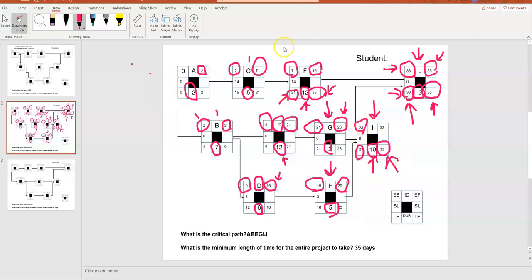For example, in task F, so you get done with task C on day 7, and you start on day 7 for task F, and it's going to take 12 days. But you know what? Actually, it takes 14 days. That's not going to be an issue. That's not going to delay the project, because even if it's 15 days, so your finish is 24, that's okay.